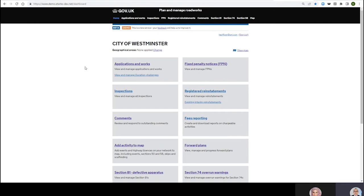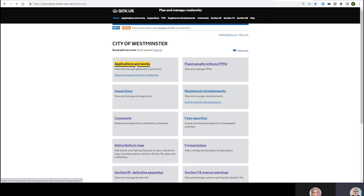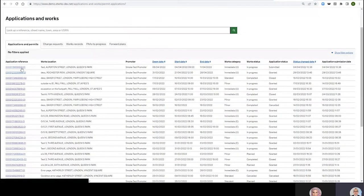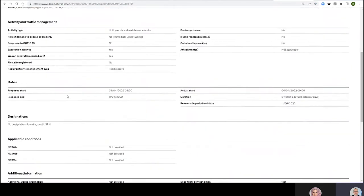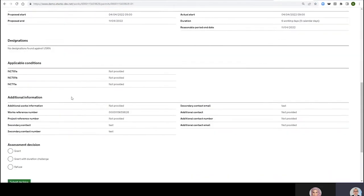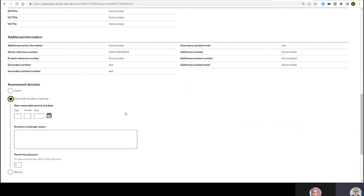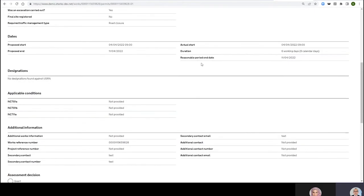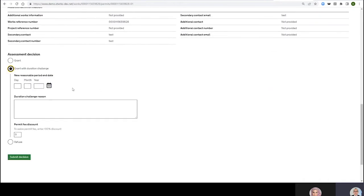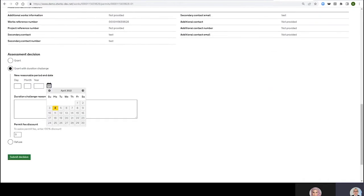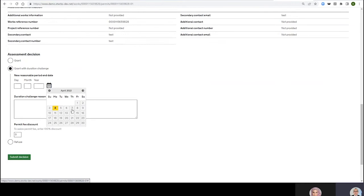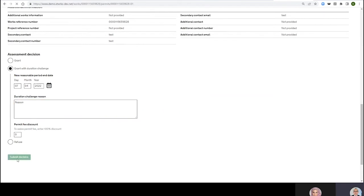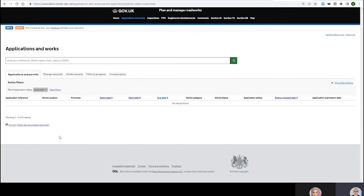Okay, Applications and Works. I want to assess this permit here that I've conveniently prepared earlier. We could have started this video a touch later in the process, but let's start with granting with Duration Challenge. They've applied for the 4th to the 11th and I'm going to say rather than the 11th, take the 7th. I'm just going to get through that, submit decision. There you go, so that's been submitted. I'm going to log in now as a promoter.